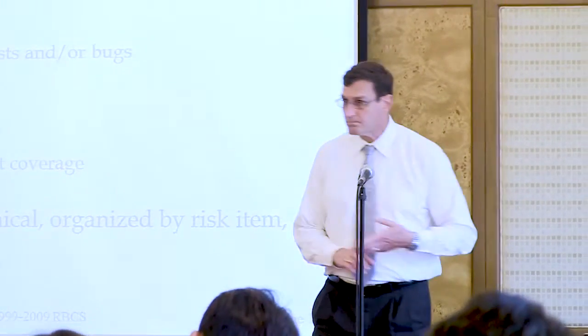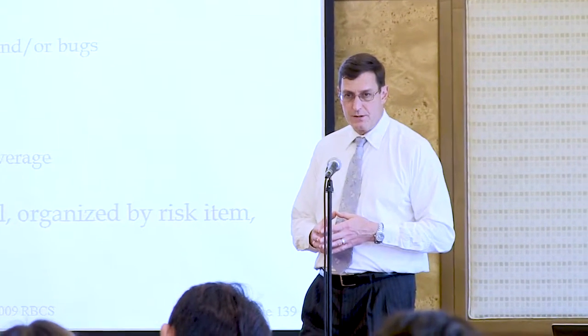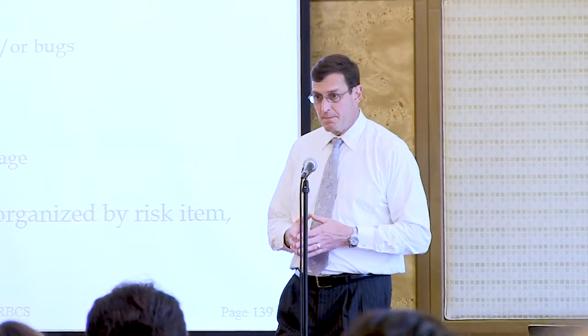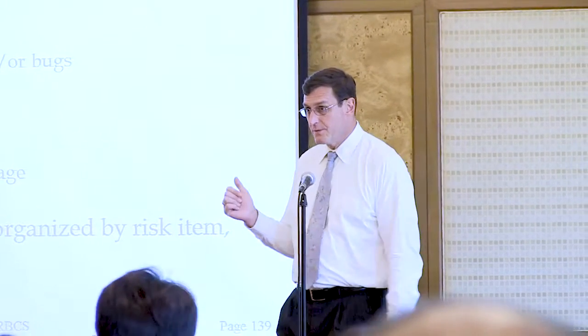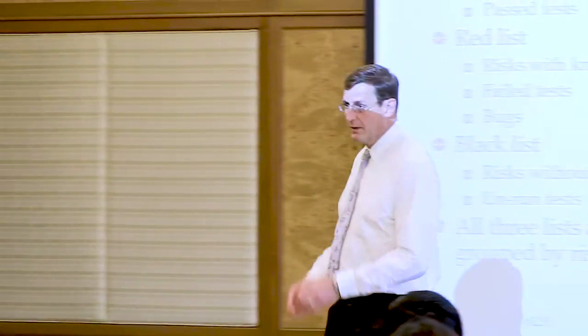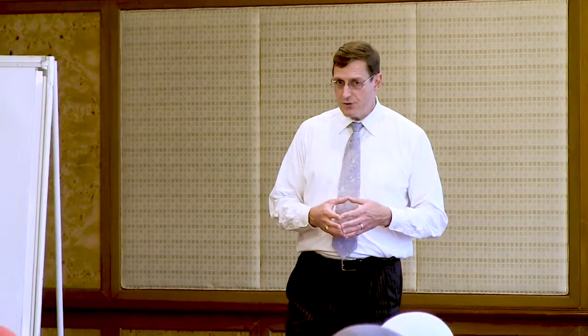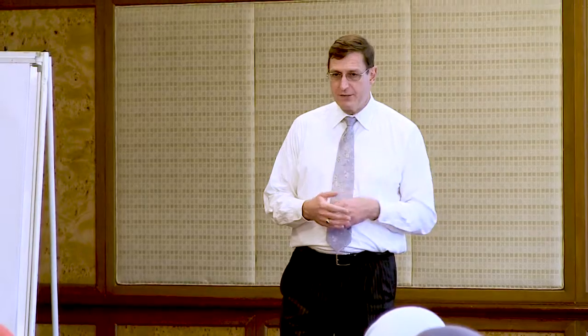And if they are comfortable with that, then they have made a risk-aware release decision. Right? They have accepted the risk. Notice that at this point, it's not like they can come back to you and say, "Oh, you didn't tell me you hadn't tested that." Yeah, I did. That was in the black list. Or, "Oh, I didn't know that that was broken." Yeah, you did. That was in the red list. Right? So you've given them status. And notice that you've given them status in terms of what the stakeholders collectively told you they were worried about.